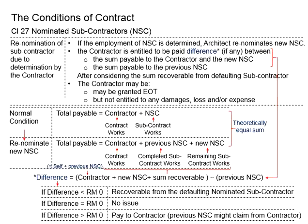In the case that the difference is more than zero, this means the total amount payable by the employer has been used to finance the construction activities by the contractor, previous nominated subcontractor, as well as the new nominated subcontractor. And the sum recoverable from the defaulting subcontractor has been used to finance the damage, losses, and expenses due to the default — yet there are still some savings, making the difference more than zero. In that case, the contractor is entitled to be paid the difference.